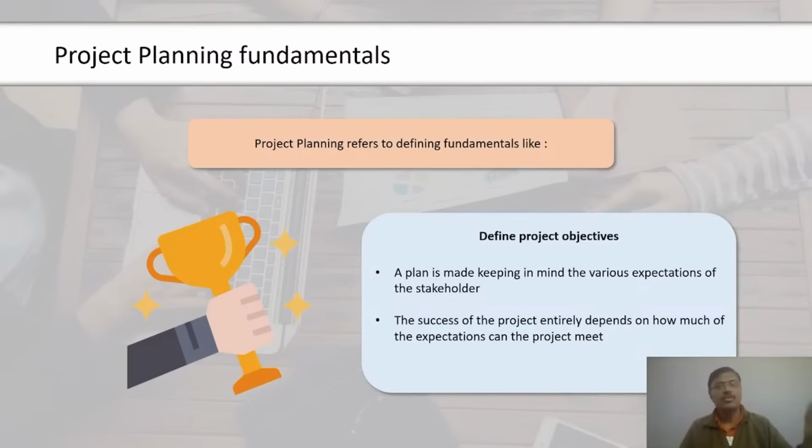Checklist is a list of items to inspect. For example, many offices have housekeeping checklists to ensure that all floors, cabinets, etc. are cleaned. Checklists are created during quality planning and used in quality control. Metrics are project-specific data that need to be measured to check the status of the project. The simplest project metrics can be cost and schedule. Metrics are also designed in quality planning and used in quality control.